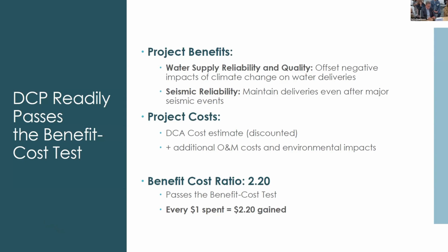We included costs for environmental mitigation of almost $1 billion. We included the community benefits program at around $200 million. But then we also included things that are not cash outlays of the DCP, but are still economic impacts. And these are things, mainly local impacts in the Delta during the construction period: increased traffic congestion, lowered air quality, noise impacts. These are economic costs that are not a cash outlay, but they're real impacts to certain people.